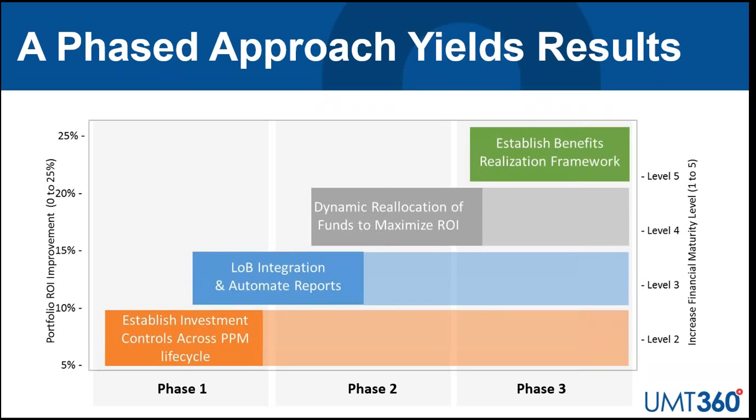In sort of phase 1.5 into phase 2 here, let's look to drive data integrity. Let's now look to integrate with our line of business systems, ERP systems, for example SAP, Oracle Financials, JD Edwards, whichever one you're using, so we can ensure that actual costs are being pulled in at the right time to help us drive those variance views as well as the forecast information.